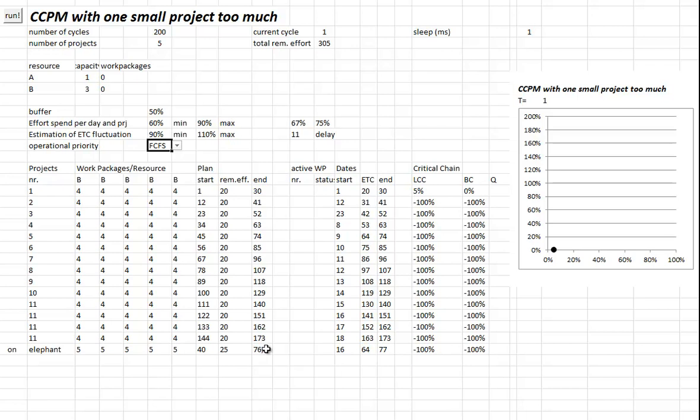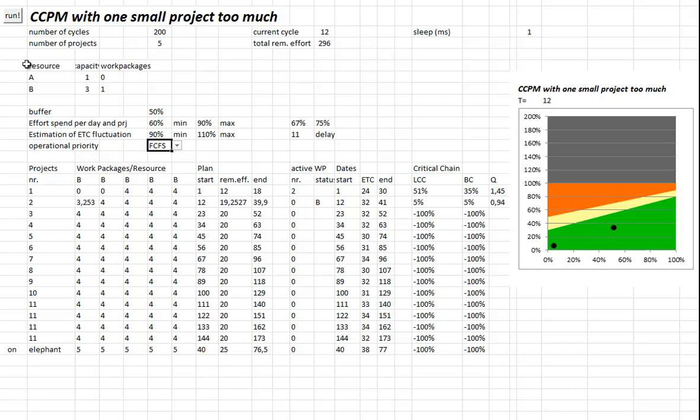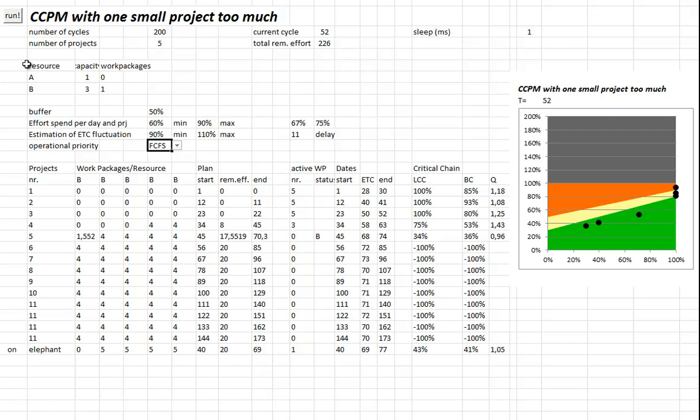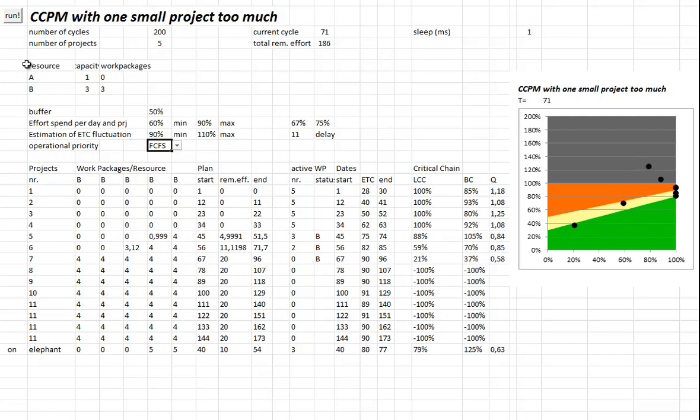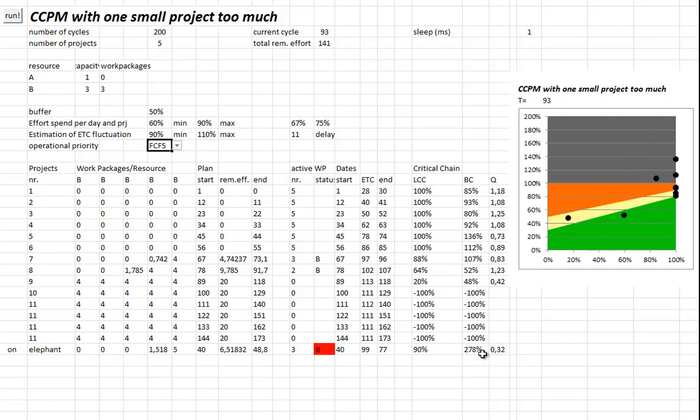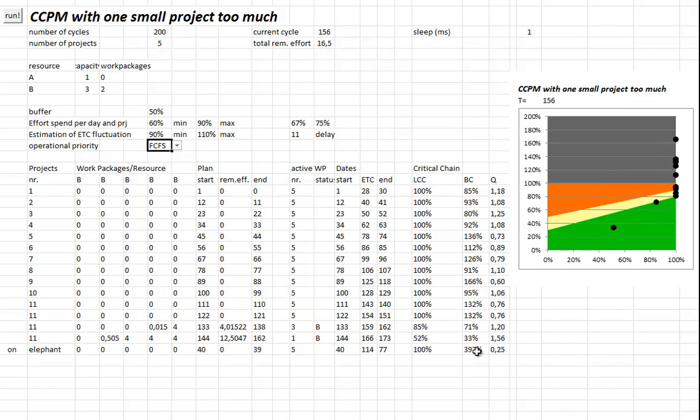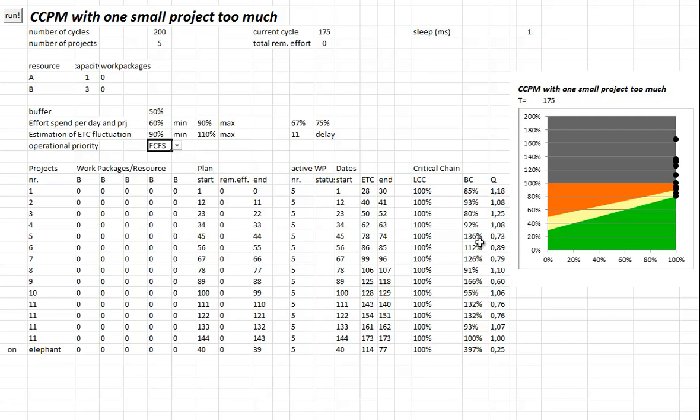Let's have a look at what should happen. Most of the projects will go smoothly through, but the elephant has to suffer really hard because he was the latest in the queue. The others suffer a little too because it's not so deterministic. Someone has to deal with the elephant, but in the end just the elephant really gets the problem.